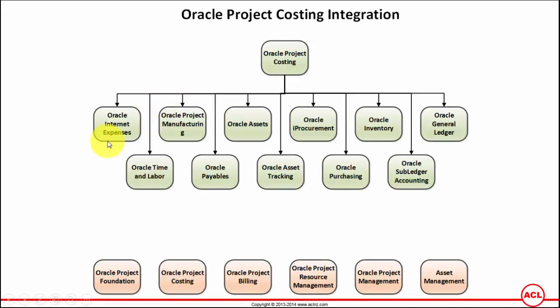As you could see, it integrates with Oracle Internet Expenses for things such as expenses submitted by employees and contractors against the project. It integrates with Time and Labor for the timesheets submitted by employees and contractors, and with Project Manufacturing for the costs associated with building a project that involves manufacturing.